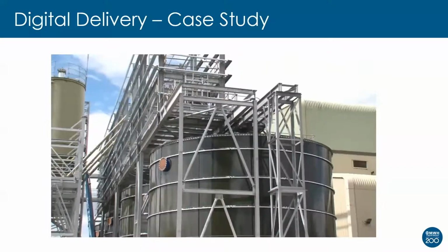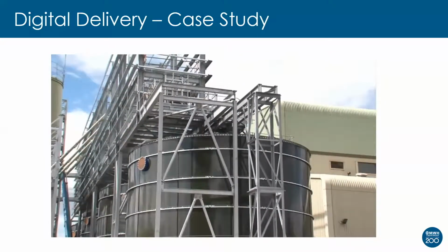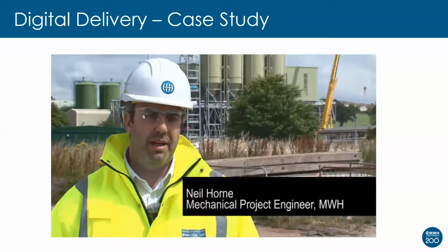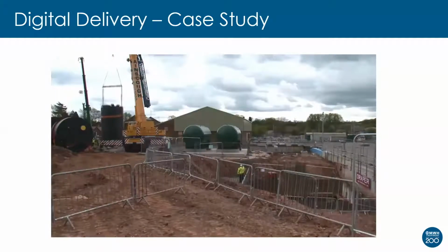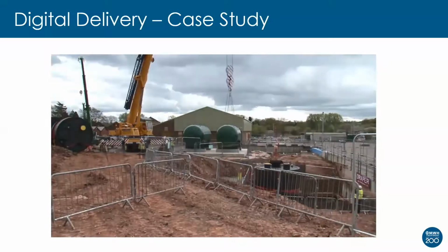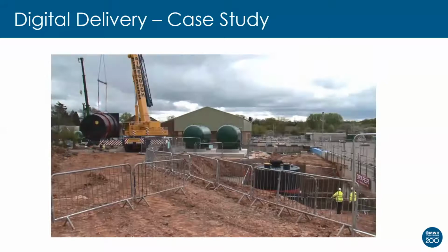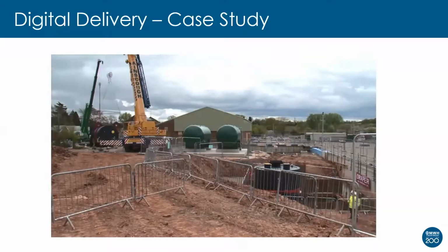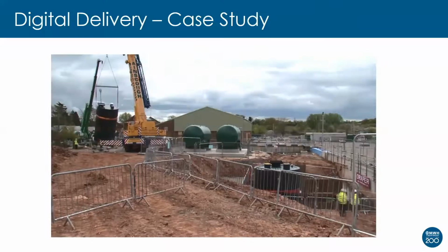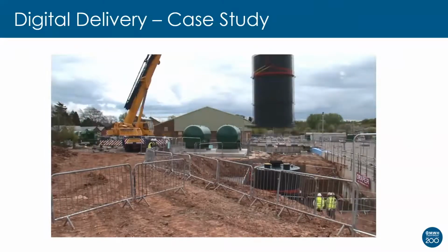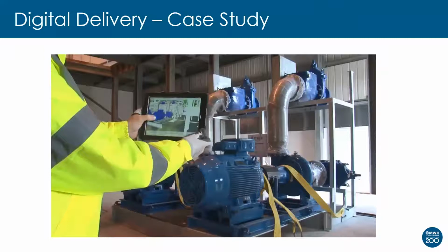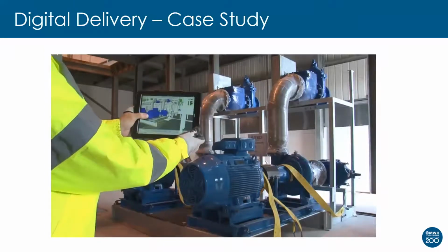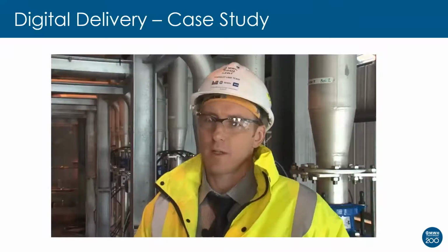I'm most proud of the way that we've been able to work closely with Severn Trent Water, collaboration with them, with the designs, and get their ideas and work with them, kicking around ideas to get things finalised quicker. We had federated models, so our suppliers inputted into our 3D model. So we had one common platform. This followed through with their design. So it was really about early engagement, greater collaboration, and driving the off-site to then reduce our on-site costs.